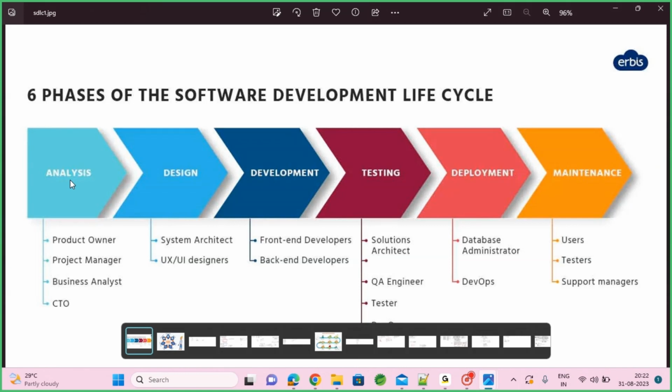And from the client point of view also, once the requirements are frozen here, we don't accept any changes. Because what we will say is, by the time of designing, if we change the requirements, the designing is already done. If you change the requirements, the entire design will be disturbed. The entire UI UX is also designed, so I can't do the changes. So bring the changes once everything is deployed. Then we will do the rework, then we will put a different budget. You need to pay for those changes also. So that's why people are really frustrated with this kind of model.